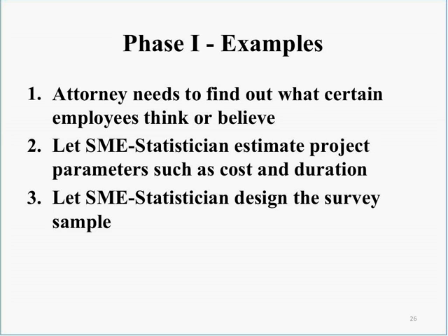And finally, in Unit 3 of Phase 1, your SME statistician designs the survey sample for your review and approval, so that you can be sure that what the statistician is doing is precisely what you need and what you want. And periodically, as a part of the agreement or contract that you establish up front, have a feedback session, whether it's once every 2 days or once every week or whatever the case may be. You want to know what kind of progress is being made. Are you on schedule? Are you on budget? So that things don't go out of control.